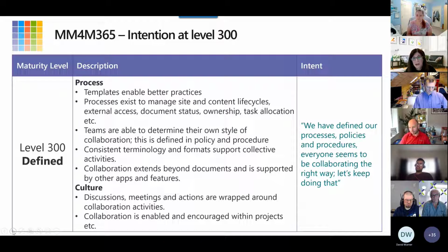And then the last part is that every time we wrap up an initiative, there is time to gather up the key assets and put them where they're supposed to go, preserve them for the future. I don't want to go into an after action report, but there has to be a time baked into our project structure that allows us to take that knowledge and do whatever we need to do to make it more findable. And so we have to make sure that it's baked into the proposals that we give to our